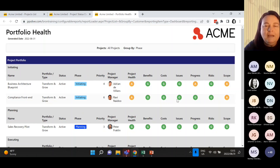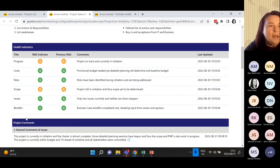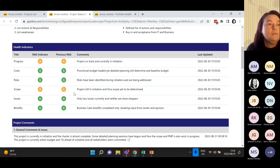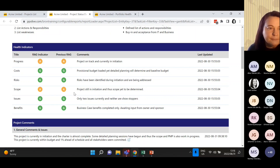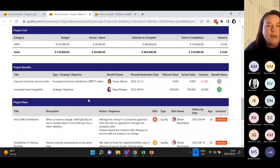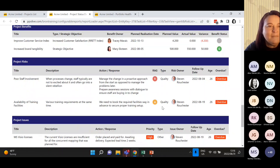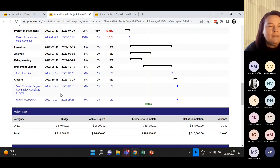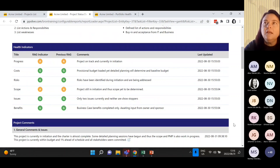Getting an idea of those trends means decisions can be made and problems can be solved across the portfolio. You can customise health indicators - add or remove them so they're relevant to your environment. There might be indicators more meaningful to you, such as procurement, resources, or even change management. A health indicator should also talk to items further down on the dashboard, like risks. If your risk indicator is green but when you scroll down to risks you see a red and an amber, your health indicator is not speaking to the reality of the data below.